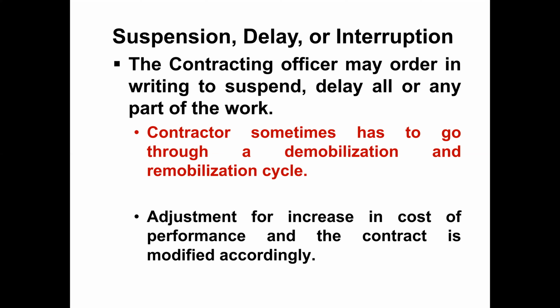Sometimes the owner needs to stop the project if there is something like underground cables from the telephone organization, or for the STC, the Telecommunication Corporation, or maybe a water supply pipe, or there is a leakage, or there is a danger that something can happen to the adjacent building foundation. So the contracting officer can stop the project.